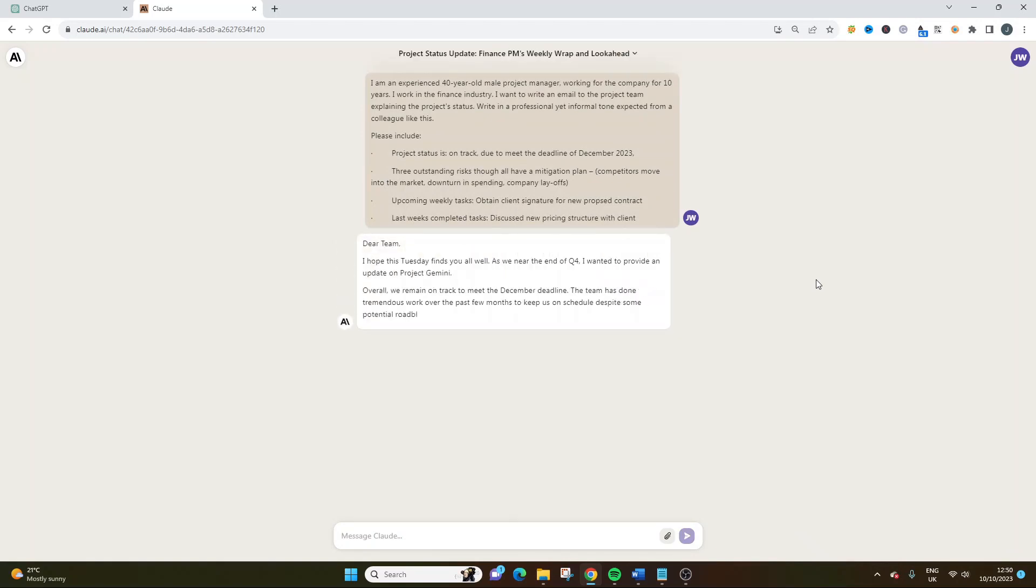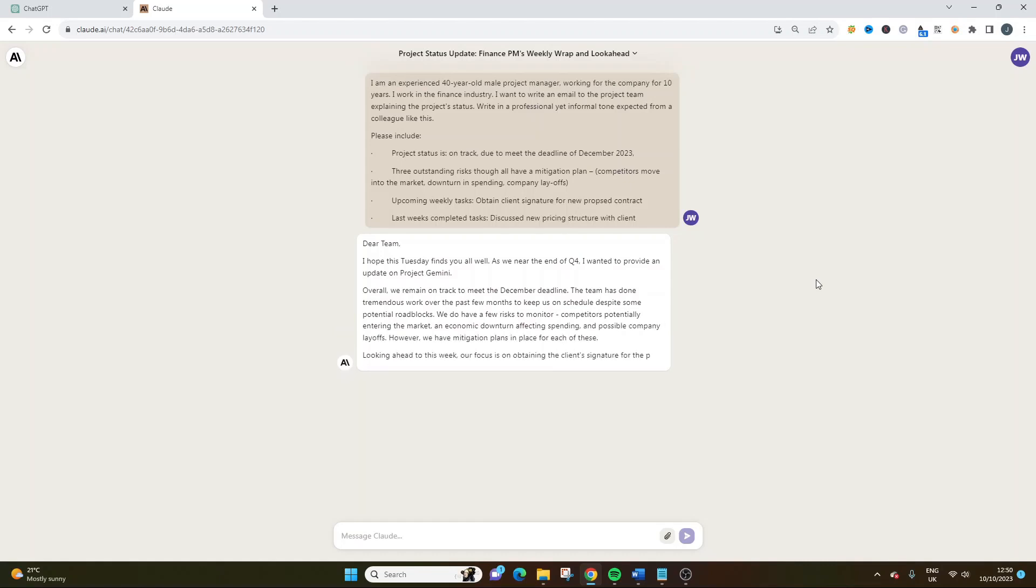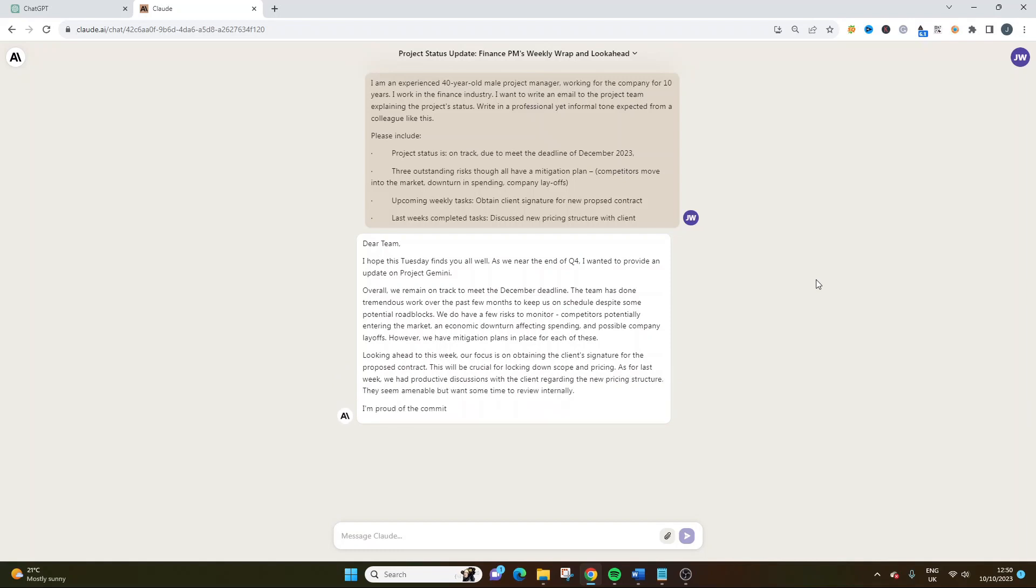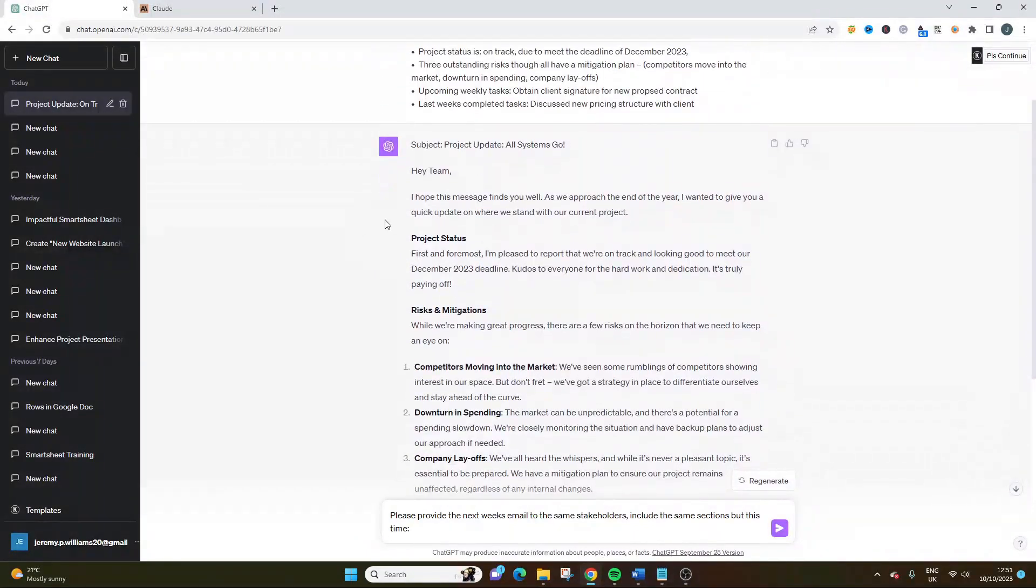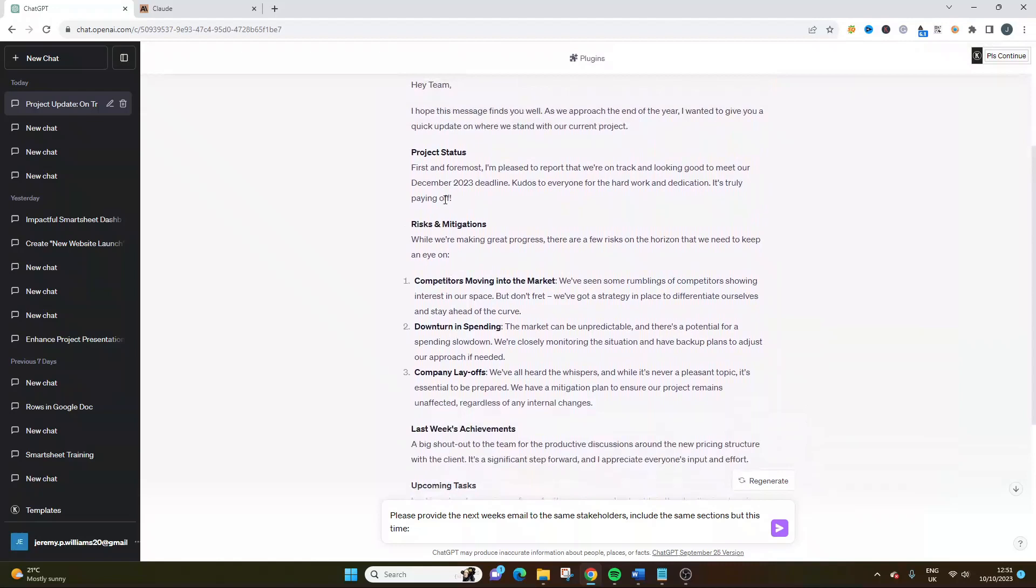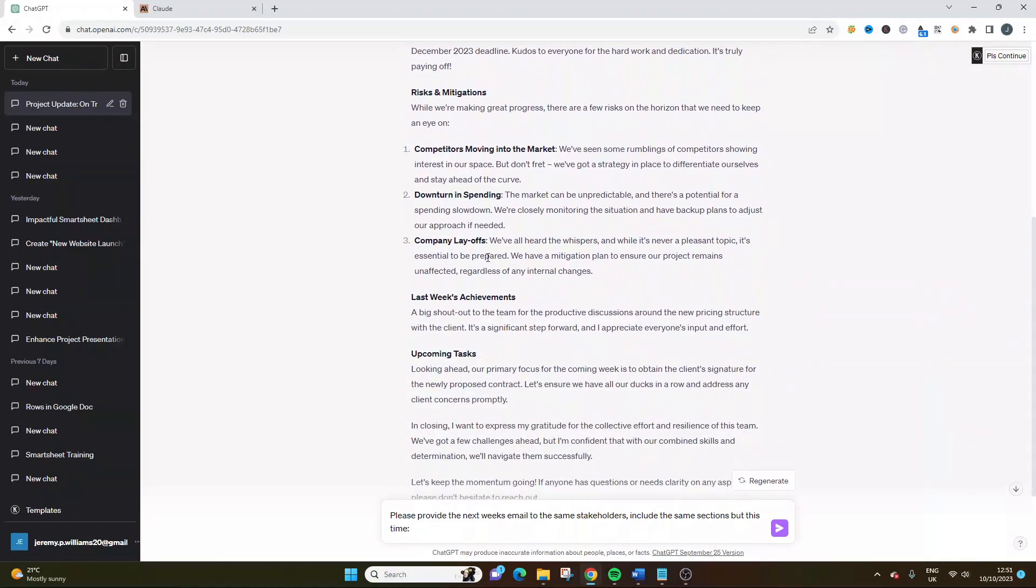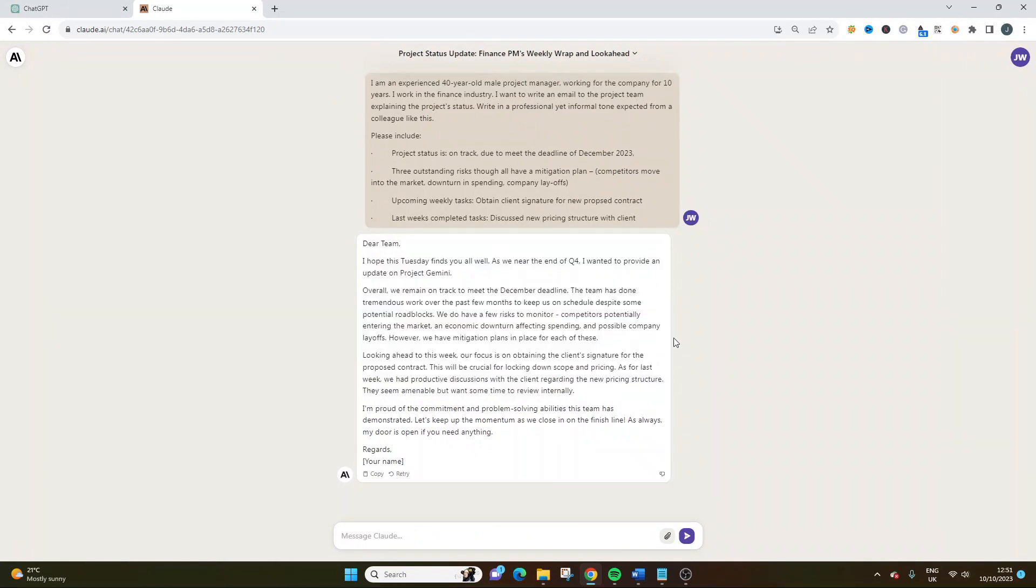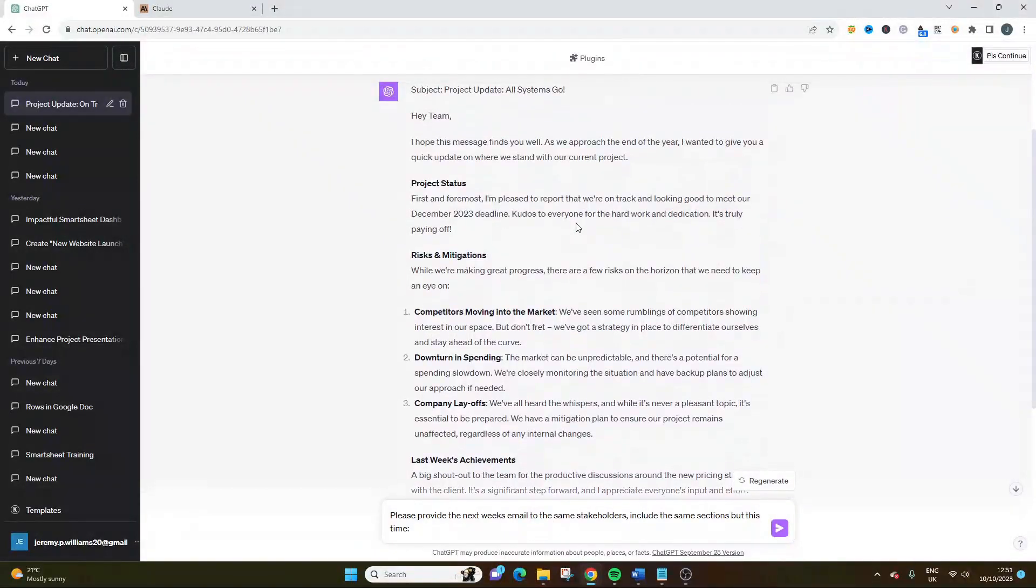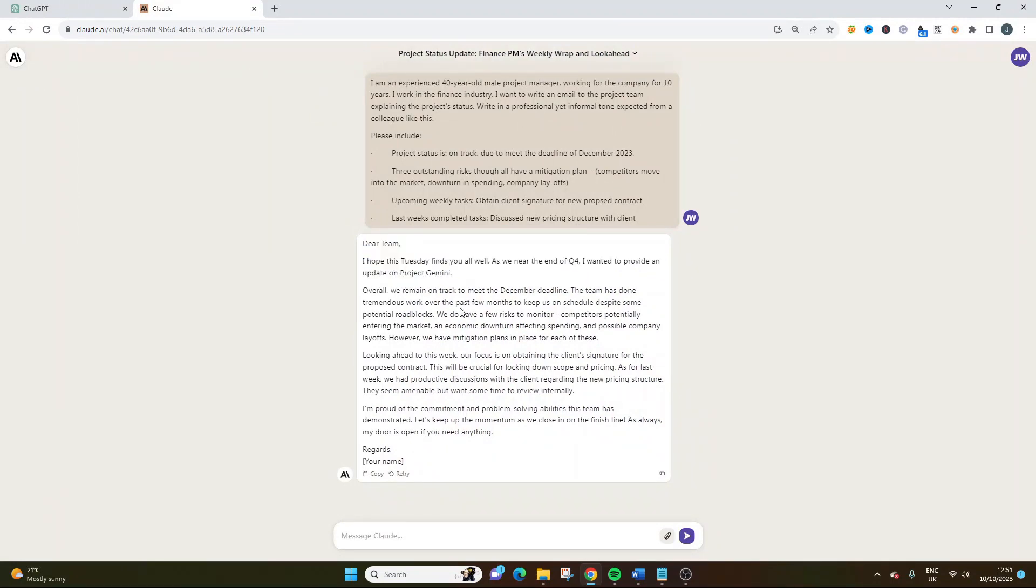Dear team, I hope this Tuesday finds you all well. As we near the end of Q4, I wanted to provide an update on Project Gemini. Overall, we remain on track to meet the December deadline. The team has done tremendous work over the past few months to keep us on schedule despite some potential roadblocks. We do have a few risks to monitor: competitors potentially entering the market, an economic downturn affecting spending and possible company layoffs. However, we have mitigation plans for each of these. Looking ahead to this week, our focus is on obtaining the client's signature for the proposed contract. This will be crucial for locking down scope and pricing. As for last week, we had productive discussions with the client regarding the new pricing structure. I'm proud of the commitment and problem-solving abilities the team has demonstrated.